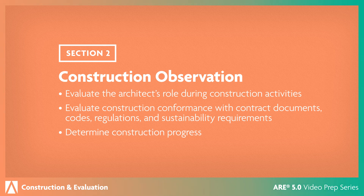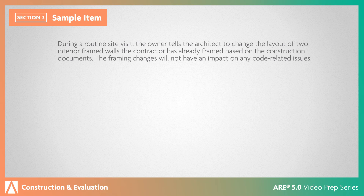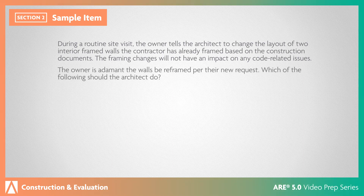Let's look at a sample question. During a routine site visit, the owner tells the architect to change the layout of two interior framed walls the contractor has already framed based on the construction documents. The framing changes will not have an impact on any code-related issues. The owner is adamant the walls be reframed per their new request. Which of the following should the architect do?